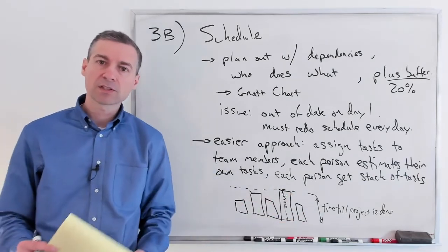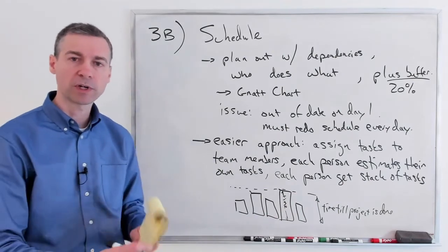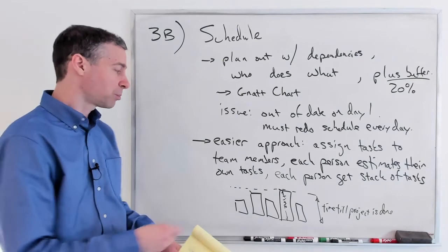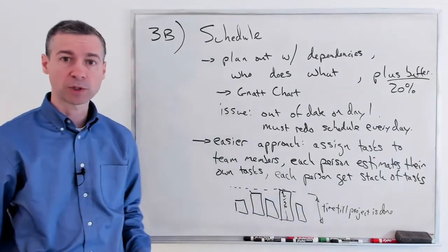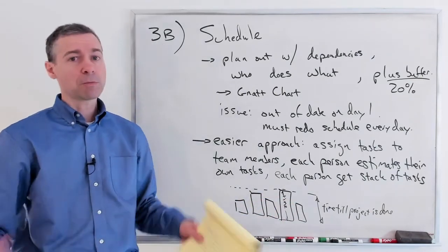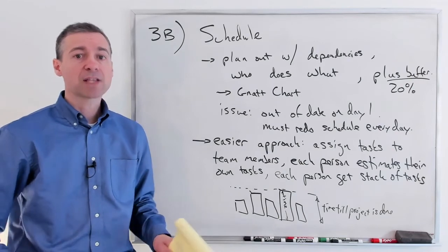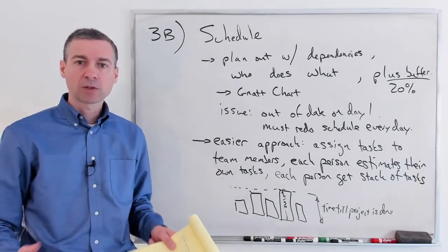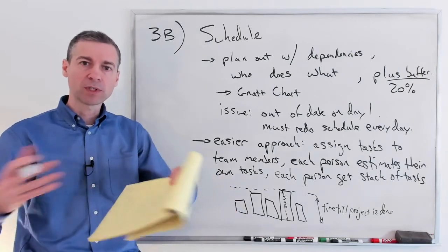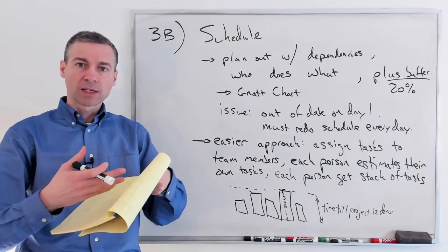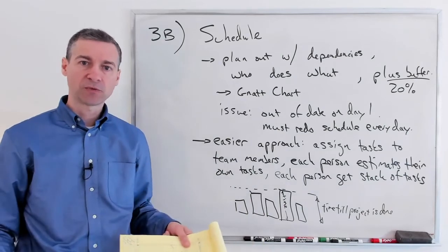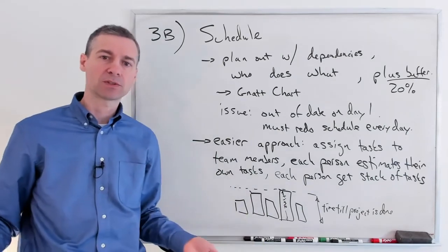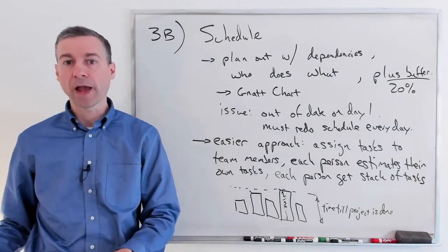And you can see that this is actually a little bit similar to what we try to do with our Scrum board. Rather than pre-assign things in the Scrum board to people, we're not going to pre-assign them, but as people become available, they take those tasks and they do them. And so we naturally load balance, and we basically end up getting the work done in an optimal fashion time-wise. So whatever actually happens in Scrum is as good as it could have happened.